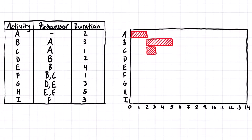Next, we're going to move on to activity D. Activity D can't start until activity B is finished, and it's two days long, so we find where activity B finishes and come down to activity D — that's where we're going to start — and this is two days, so we'll come over two.